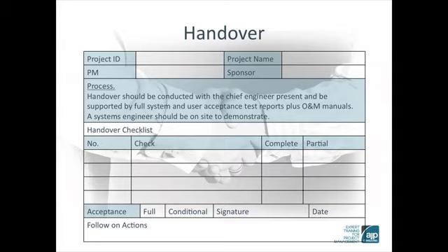While it's outside of the scope of this module to discuss actions to embed change, it's worth stating that a majority of change would be accepted and better utilised if the project and business as usual teams work together to plan and execute actions to embed the changes, like involving end users in the design and delivery processes, training and communication. It's this early identification of handover needs that most directly influences a successful handover and avoids delays or frustrations.